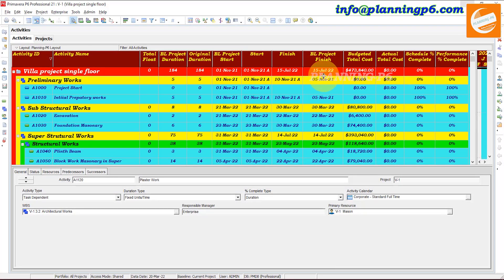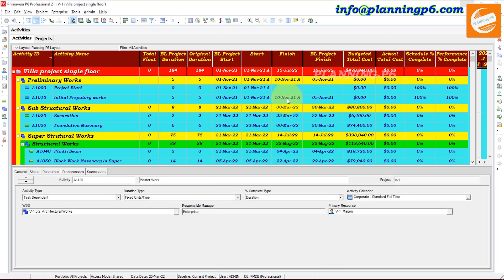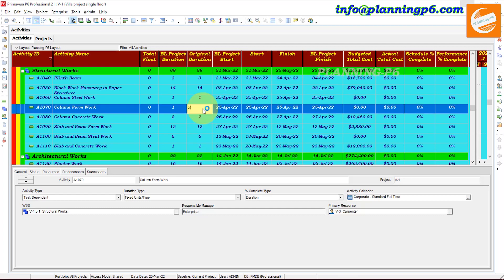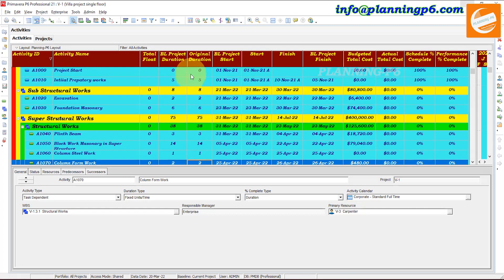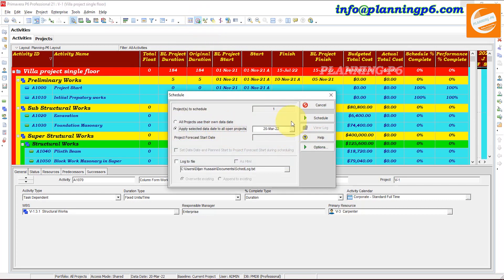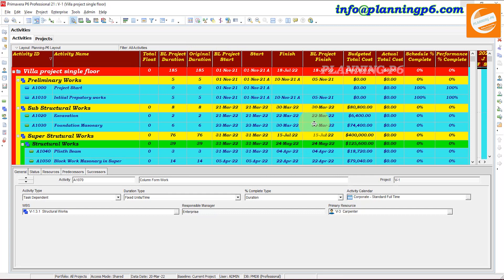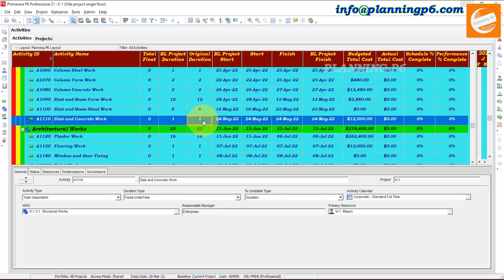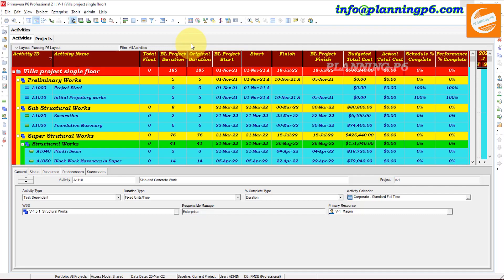Now 15th of July is the project finish date here, but we need to freeze 20th of July. We have a 5-day gap, so let's add two more days and schedule again. Now it shows 18th of July — we will add three more days to a printer activity and schedule again.